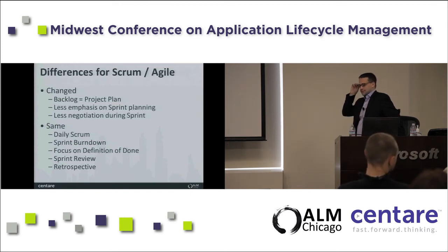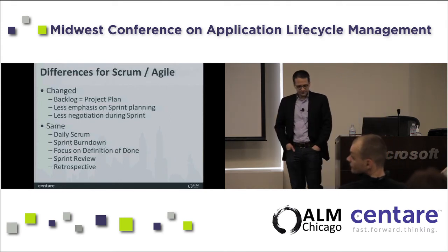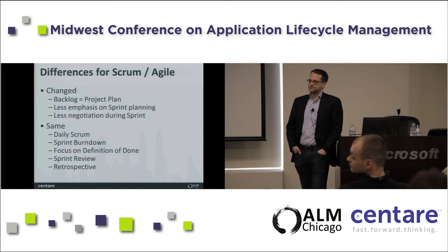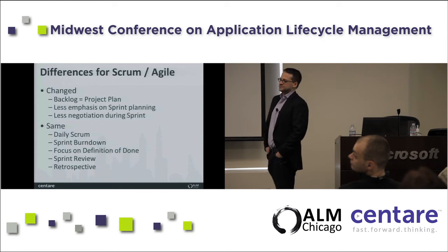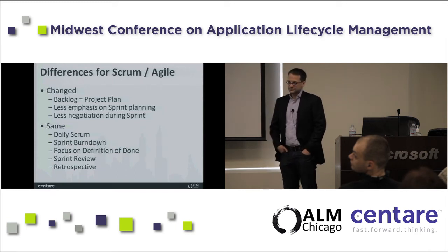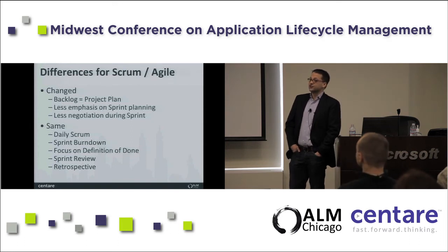Yeah, I think the other thing, kind of like what you talk about, is you may have that measurable also. Like we're going to improve the performance of the security subsystem by 20%. That's tangible. It doesn't mean I need to get 7 PBIs done, but not 8. It doesn't mean any of that. It's a tangible goal outside of that, like you say, that people can rally around. It's good that it's understandable.